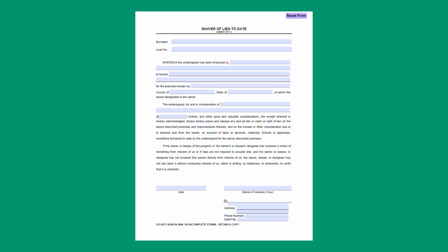As part of your construction loan process, you or your builder will be required to keep an accurate record of the ongoing payments made to your suppliers and subcontractors throughout your project. In addition to the sworn statement, GreenStone uses a specific form to track these payments. A lien waiver, sometimes called a lien release, acts as a form of receipt between you and your subcontractor.